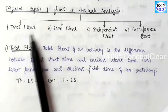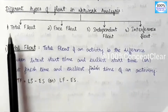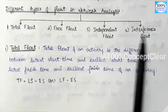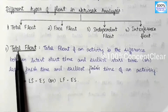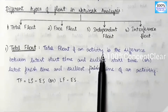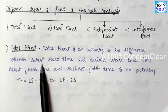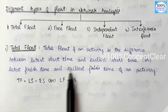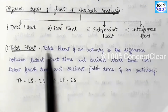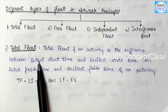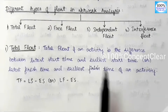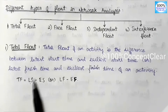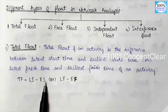Next, in Network Analysis, there are four types of floats. The first is Total Float, the second is Free Float, the third is Independent Float, and the fourth is Interference Float. Total Float of an activity is the difference between Latest Start Time and Earliest Start Time, or Latest Finish Time and Earliest Finish Time. The formula for Total Float is: Late Start minus Early Finish.